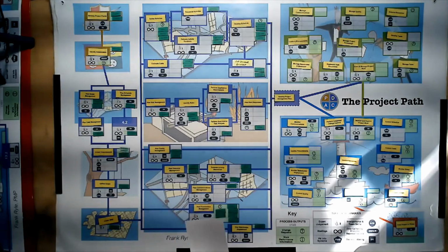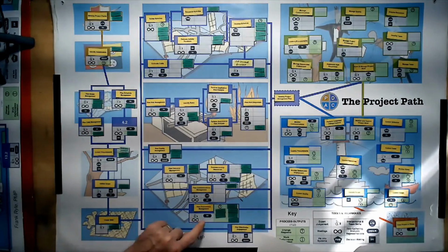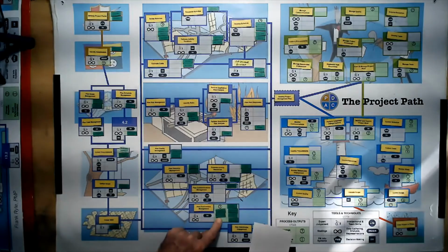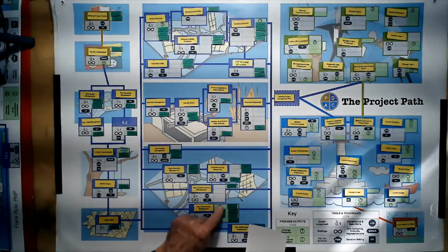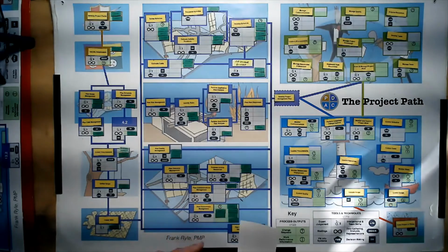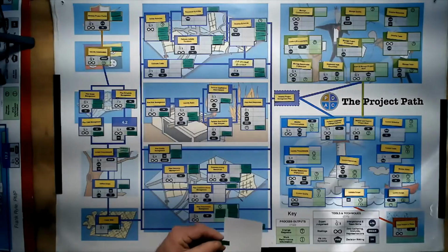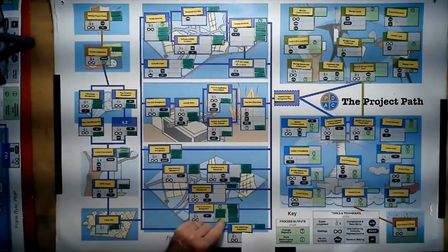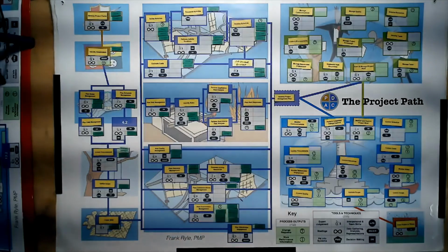So recognizing that when we went back to the work breakdown structure, we saw the work packages, we decided to make or buy each of the work packages, and therefore we've made a decision. And I think it's just capturing those decisions to say yes, make or buy, and potentially why as well. Now, independent cost estimates is a useful thing to have, to say that we kept a record of those at the time. It will definitely help us to build up our estimating database.